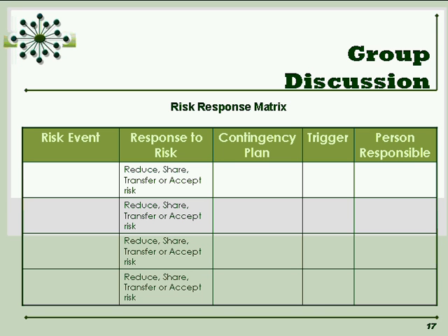One of my colleagues brought up a point here that it might be good to consider a backup for each of the vendor and staff functions, particularly critical functions like phlebotomy, and also equipment and equipment breakdowns, because those leave us really vulnerable. So maybe one thing to think about in doing this kind of analysis is those particular events that, as we said with the plan, are critical to implementing the study.